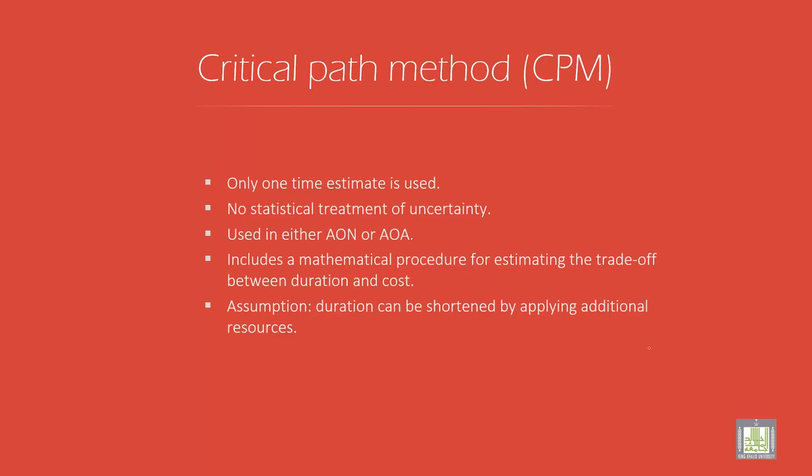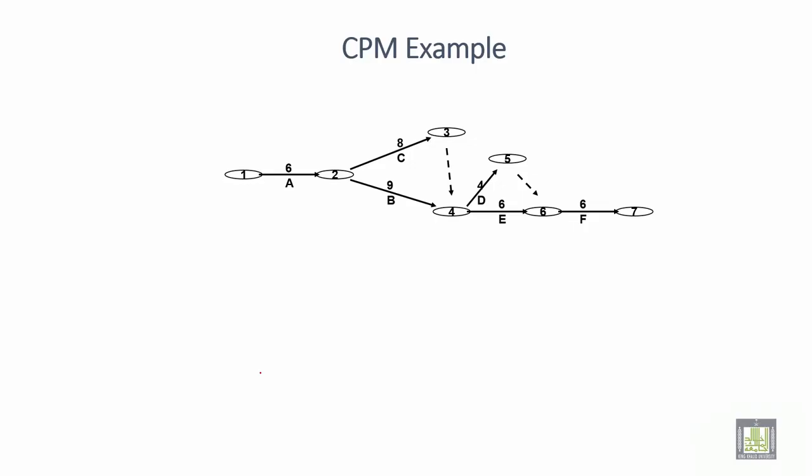Then Critical Path Method CPM. CPM actually uses only one time estimate, and there is no statistical treatment used. It uses either AOA or AON. It includes mathematical procedures. Also, the duration can be shortened by applying additional resources. There is an example in the next slide. It will be more clear if you see that example. I will show you the example.